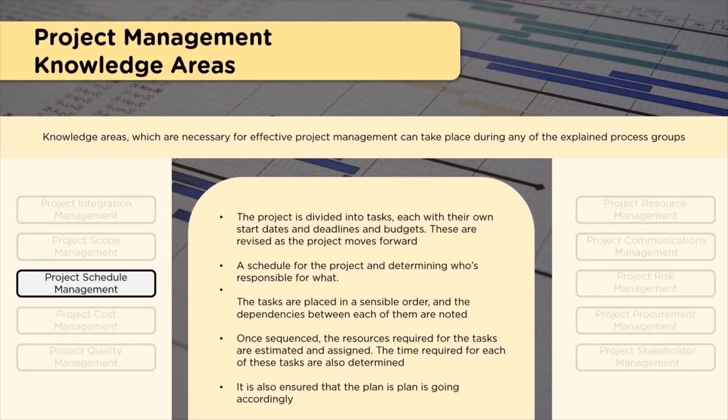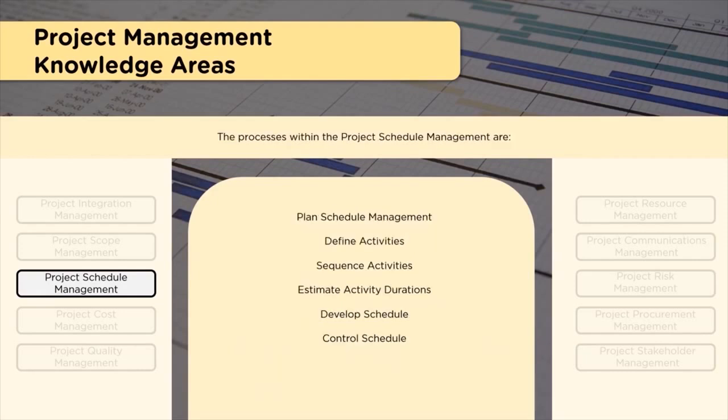Project schedule management also uses a very important technique called the network analysis technique, where we speak about the critical path, then forward pass, backward pass, then identification of floats. The critical path refers to the longest path in the established network diagram of a project, and that will be the minimum time required for the project to complete. So this critical path needs to be closely monitored as the execution of the project happens, because any delay in this critical path will delay the project itself. So that's a summary of schedule management. Now let us look at the processes which are involved in schedule management.